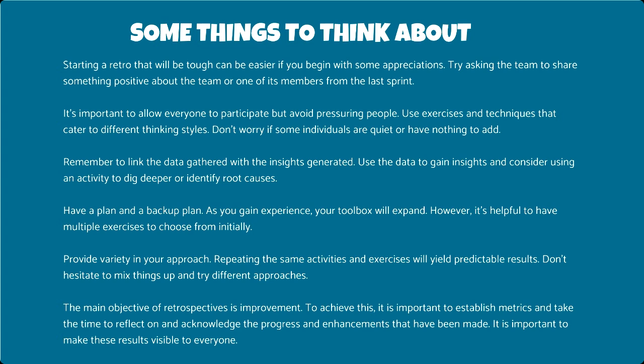And then I like to change that up with something like a starfish exercise or a radar chart exercise, where we're looking at gathering data about what are all the wastes we notice. We can bring the lean wastes in, and we can start to see what are the wastes we've got in our team, and let's rate our process against lean waste or something like that. Or let's rate our technical practices and understand all the different things that we do, and let's see how good we are at all of these things and what we might want to change. So there's loads of different ways we can start thinking about how do we improve, and what can we do, and we can create focus for each of those things.